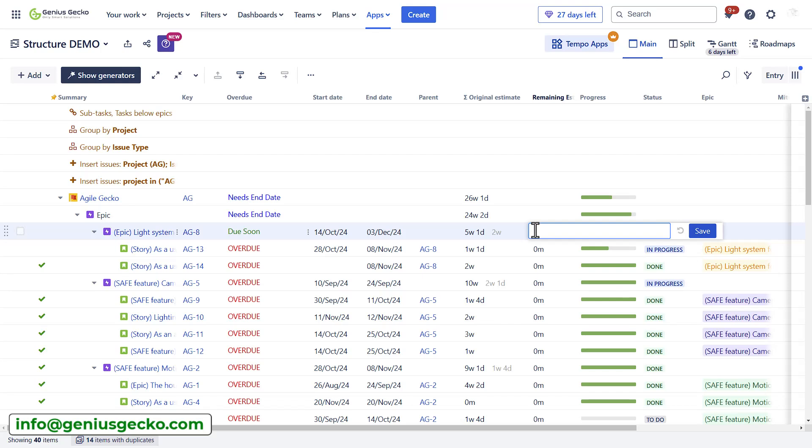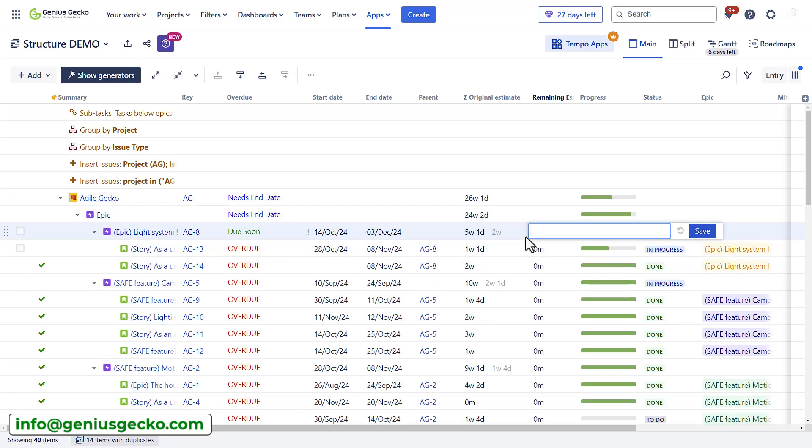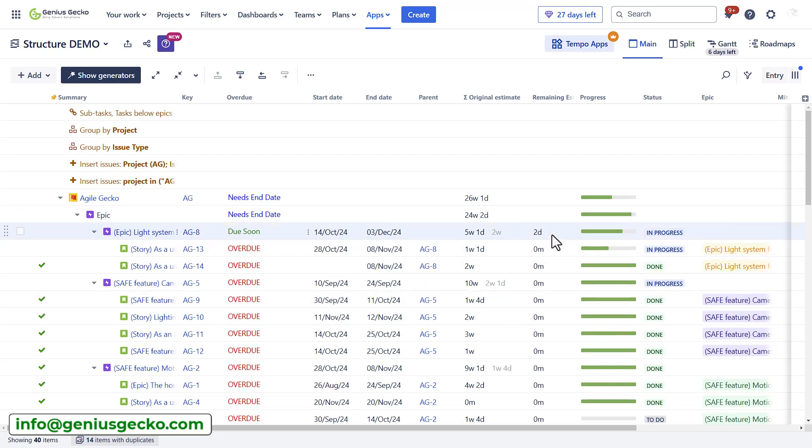I've added the start and end dates and a tip for you, whenever you want to update fields using this interface, make sure that these fields are added to your issue screens for each of the projects. Otherwise you will receive an error. Let's give it a try if I configured it correctly. So I did manage to update the field. Otherwise you will see a small red triangle in the top left corner of this cell indicating there is a warning and your Jira issue will not be updated.